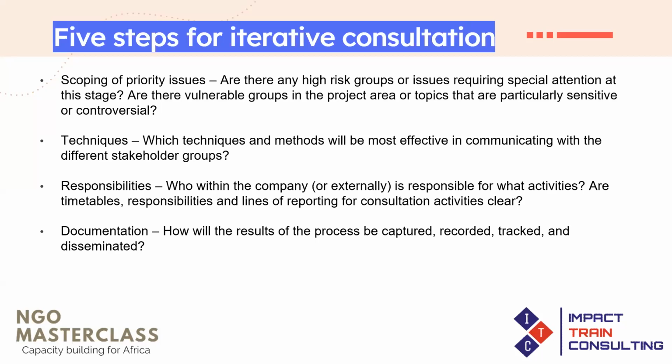Then you need to think about responsibilities. Who within the company or the organization will be responsible for what activities? For us as CSOs, you'll be thinking who within the CSO is going to be responsible for what? So you need to think about the roles and responsibilities of every one of your team members when you go out for consultation. What will our team be doing? What will they be saying? Who will be in charge of what activity? That's what you'll be doing. You have to determine roles and responsibilities of your staff and your volunteers before you actually go to consult.